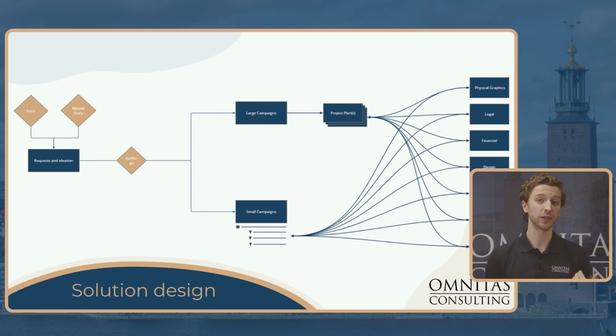But moving one step further, now it gets a bit trickier because now we're going to have, let's say, 30 tasks, but we only have a single project, right? So for that transfer, we need to define some form of logic. For example, take the status column. If a project status is working on it, what should that be on a task level? Does that mean a single task has been started, is working on it? Or even going one step further, let's say that one task is delayed. Should that mean that the entire project gets marked as delayed? Or does it need to be 3 tasks for the entire project to be marked as delayed, etc.